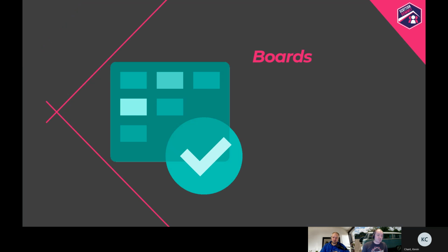Anyway, we better discuss Azure Boards, Sander, since I'm going to be using it to organize our backlog items. Now, Azure Boards can use basic, Agile, Scrum or CMMI templates for each project that you create in Azure DevOps. As I mentioned earlier, these templates are also called a process. So if you remember, I showed it in the organization settings earlier where you can change them. Because we're using Scrum, Sander, we'll probably want to use the Scrum process. For now, we can keep this process as standard, but we can customize it if we need to by doing things like adding, removing columns and adding various other objects into it.